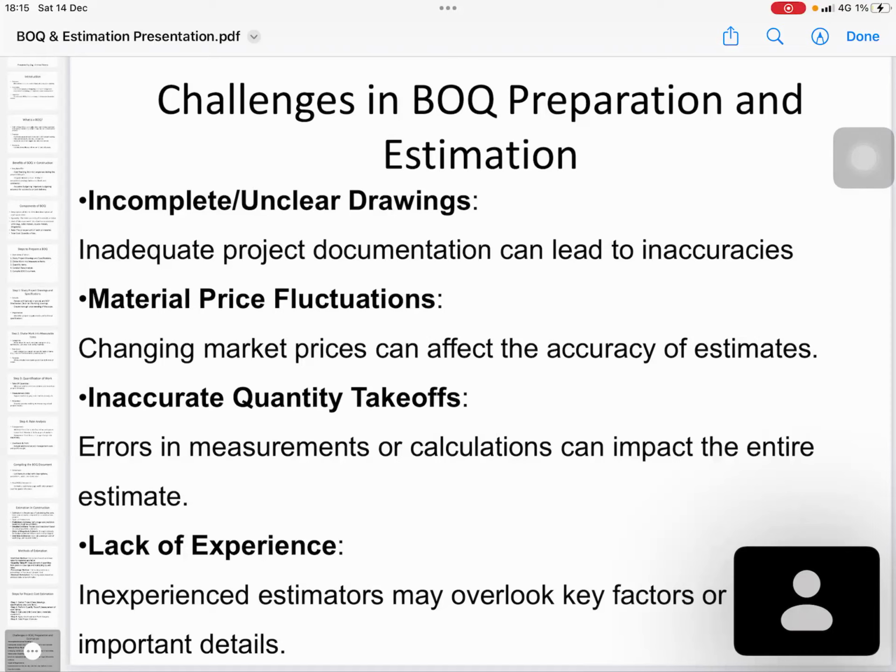It's very challenging if your price is fluctuating. Sometimes fluctuations are allowed in the SIDA documents, but with such a drastic increase, you cannot claim through the fluctuation equation.